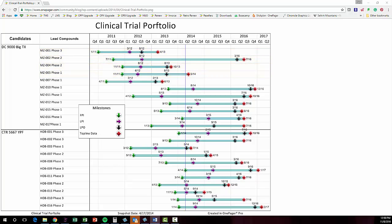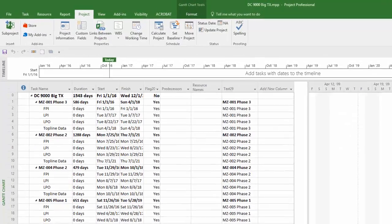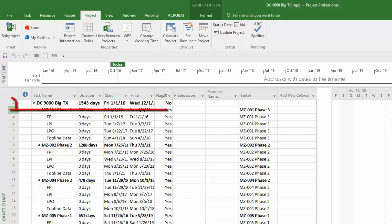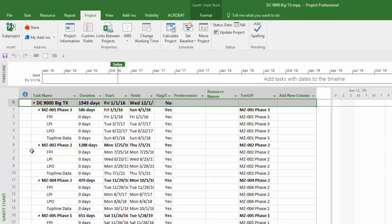All methods require a couple of items that must be set up properly within your separate source project files first prior to launching OnePager. The first is the level zero summary task, which is what OnePager uses to differentiate the data between your project files.